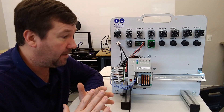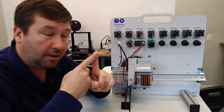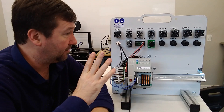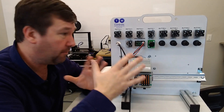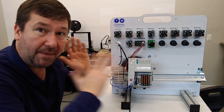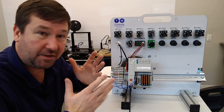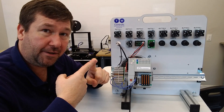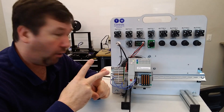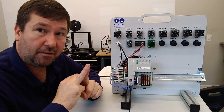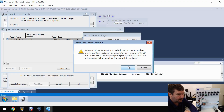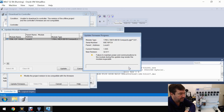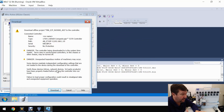Now, if there's ever a time to be patient: make sure your laptop's plugged in and that you have power. Also make sure that electricians aren't doing things that may kill the power while you're trying to do this if you're commissioning the system. You don't want any power failures, you don't want any breaks in your communication, and you don't want your laptop battery to go dead. It's then going to give us a warning about the SD card — click Continue. Our firmware update is done.